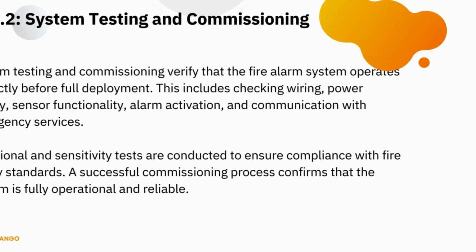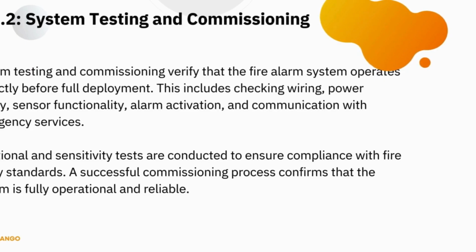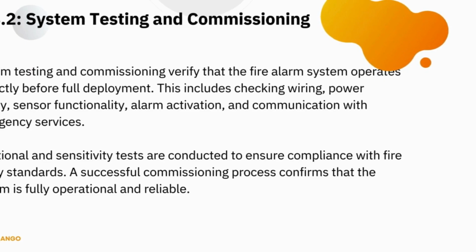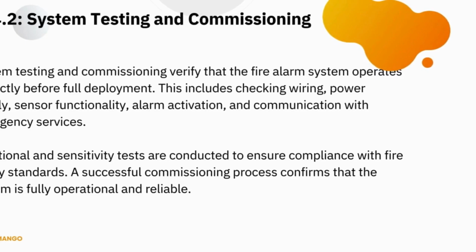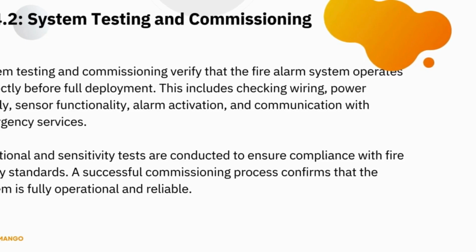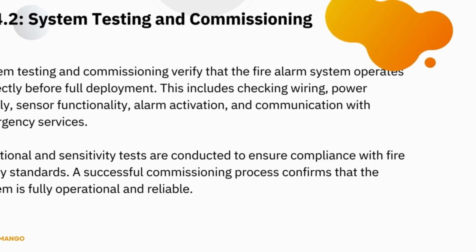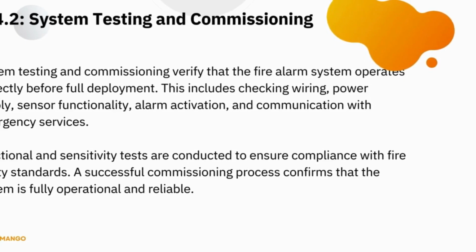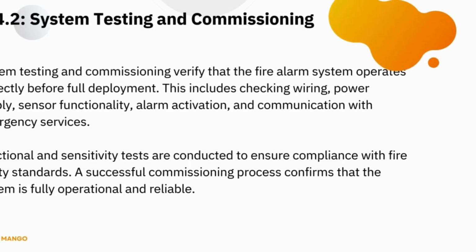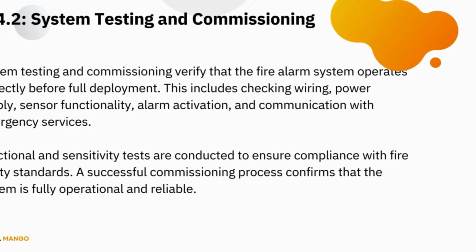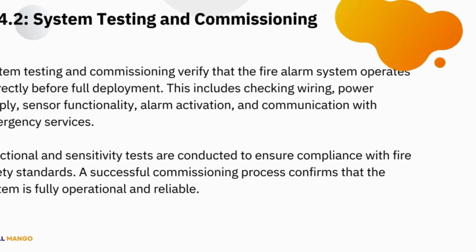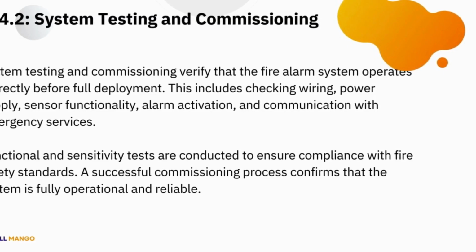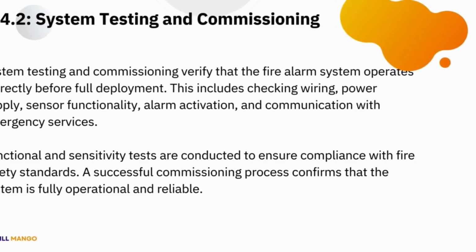Okay, so yeah, after installing your fire alarm system, you have to do a test. Let all your clients or some of the major people, the technical people, or the security department be aware that you're carrying out a test, so they can inform all the people in the structure that a test is going on, and they won't be panicking and scared.